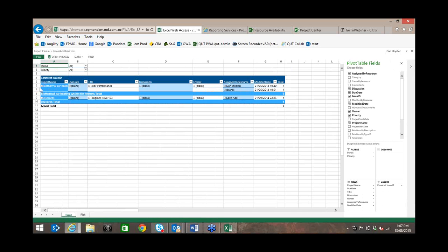So you might think, well, that's close to what I want, and with some modifications that would be perfect. And it's about this point that we need to understand a limitation of the Excel services reporting technology. Essentially, Excel services can only query a single data source. Now, Microsoft, when they designed Project Server, set up the project site template to have a risk and issue list and have standard fields within that list.